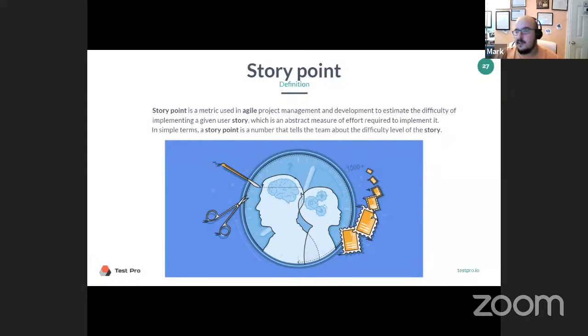This is simple, right? This is only going to take you an hour, but you'll find this the more you work, once you start to get in the field. A lot of times, you don't want to underestimate, right? You say, oh, that's only going to take me, I'm a superstar tester, it's only going to take me 2 hours, and then suddenly you're stuck 2 days troubleshooting this bug or whatever. So it's better, you don't want to be too crazy on the other side, too conservative, but you want to have a fine balance.